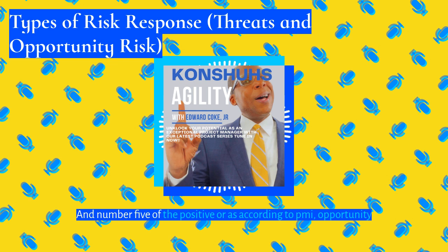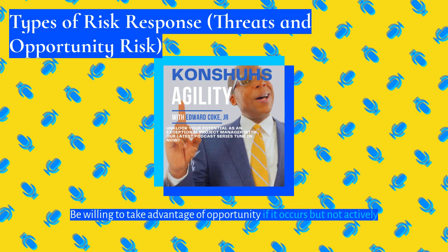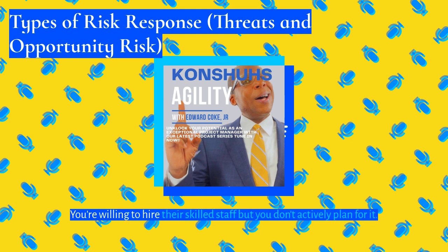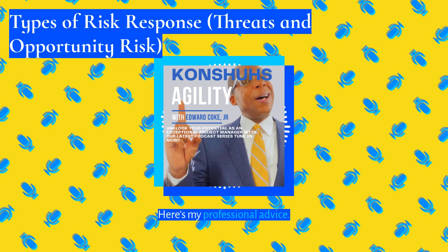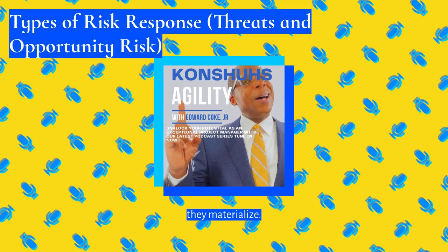And number 5 of the positive, or according to PMI, opportunity responses: accept. Be willing to take advantage of an opportunity if it occurs, but not actively pursuing it. If a competitor goes out of business, you're willing to hire their skilled staff, but you don't actively plan for it. Here's my professional advice: maintain awareness of accepted opportunities and be ready to act if they materialize.